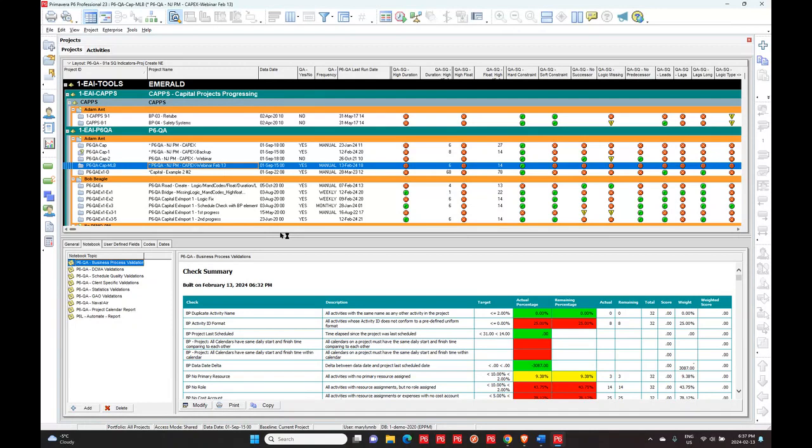And the reason I say that's not helpful is because I've seen it happen. I've seen it play out so many times. Your updates are likely not going to be correct, because what are people going to do? They are going to update the first erect scaffolding, and they're not going to split it up the way it needs to be. I have that exact problem with the schedule I'm loading right now with a client.